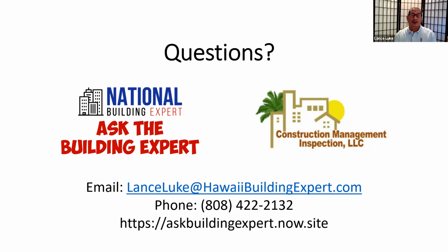Now, we're not trying to be mean or anything, but if the plumbing contractor has another division where they do remodels, then you may ask them if they can help you with that. But normally, the contractor's there to do his one job. Can you imagine? There's a schedule that they have to meet, and if they spend an extra 2 weeks working on that one unit, now they're 6 units behind on a whole global scale of doing the entire project. So that's normally what happens.